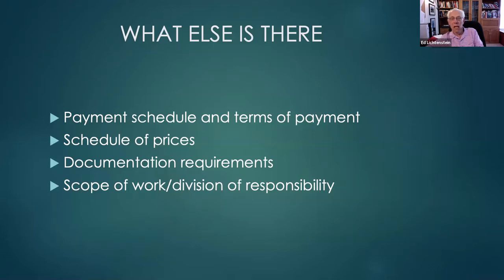That can be in construction, it can be in almost any industry. You list out, here's a schedule of prices, and that helps you if there are changes coming. Okay, documentation requirements. In order to show that I have performed the service or provided the goods, am I going to have to provide you documentation?